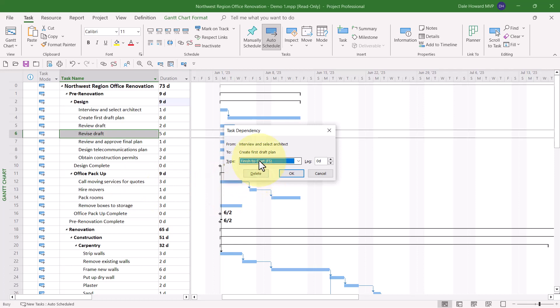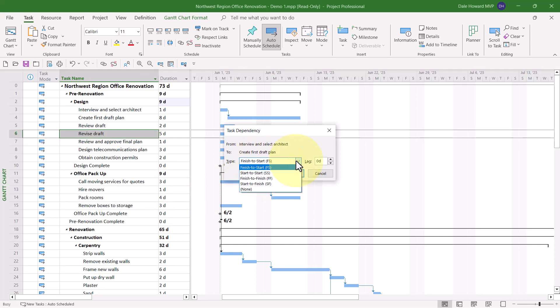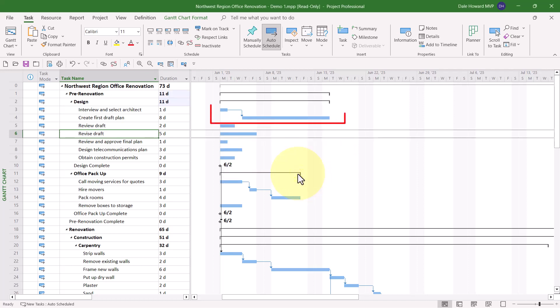In the task dependency dialog, you can change the type to any of the four available. You can also add lag time. What I need is finish to start plus two days of lag. And there we go. There's the first trick.